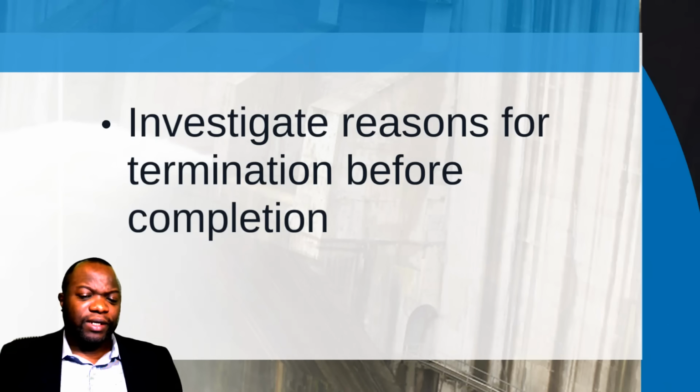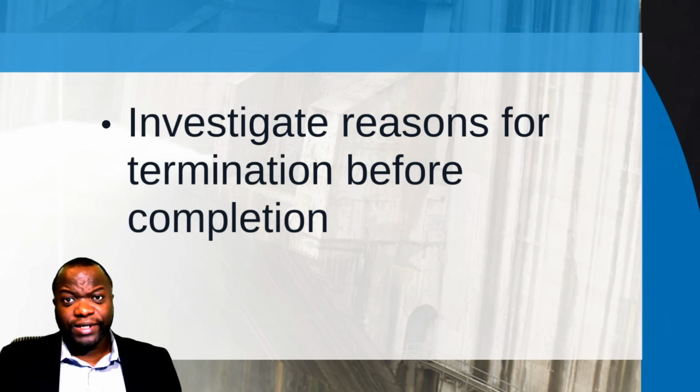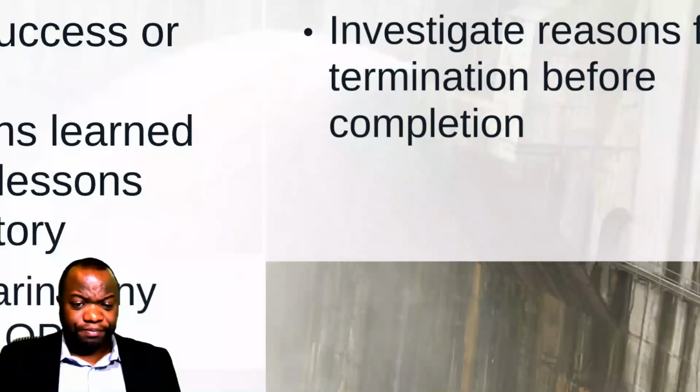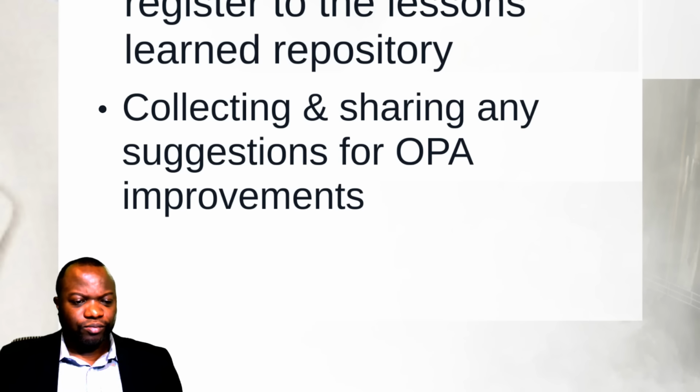Next, you want to investigate reasons for termination before completion. So let's say your project ends abruptly. Don't just shut it down and return all the monies. You want to first of all identify where did we really start and why was this project terminated. So reasons for termination, that is also something you want to do in this process.